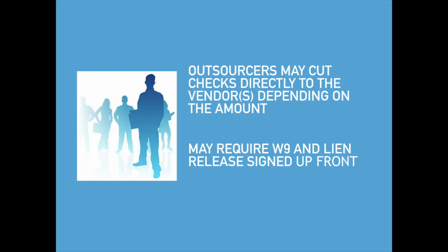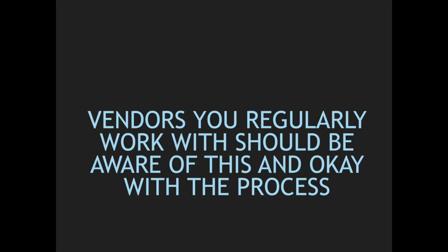Okay. Now, another thing is that the outsourcer may require the vendor to complete a W-9 and a lien release or a lien waiver up front. And that lien release basically says, I've received full payment and I promise not to put a lien on your property, right? Which is really hard to do, but if they want to get a check cut to them, that's the rules they have to play by. So that's why we say the vendors you're regularly working with really should be aware of the REO process and they should be okay with it.